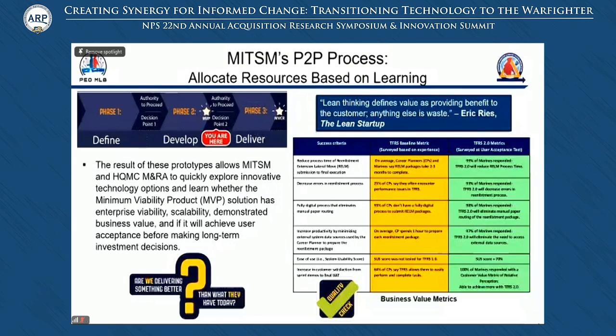The second column in orange is the baseline metric of how the current as-is process works today. To determine this criteria, it required us to create a survey. We used the Department of Navy Voice of the Customer tool, Qualtrics. We developed the survey and published it on social media, on Marine Online, and in the current system TIFRS that the career planners use today. We received over 1,500 responses across all our personas. The responses quantified how long it takes today to complete the reenlistments.